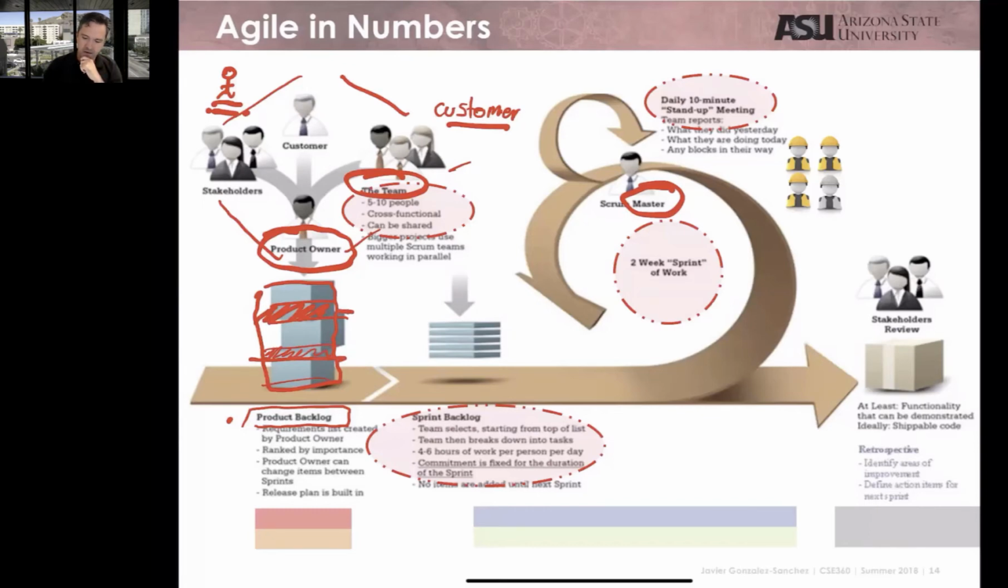Maybe these ones and these ones. Who is going to select which ones? You as a team with your customer. All the people involved have voice and are able to vote which are the user stories that we want to work on, that we want to create the next 2 weeks.